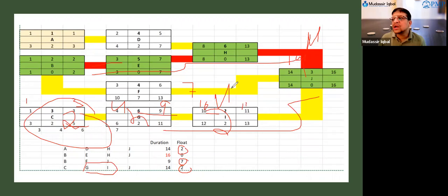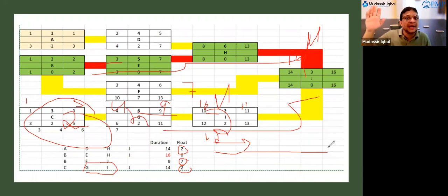Fine. You can say, okay, I will delay this activity for 2 days. So instead of starting on 10, I will start on 12, so that Mudassir will work for 5 consecutive days. Instead that we pull him from other project or from other task for 2 days, and then he goes back. And then when I go back, I got busy somewhere else. I couldn't able to come back on time. So this float is a tool in your hand that you can plan well.